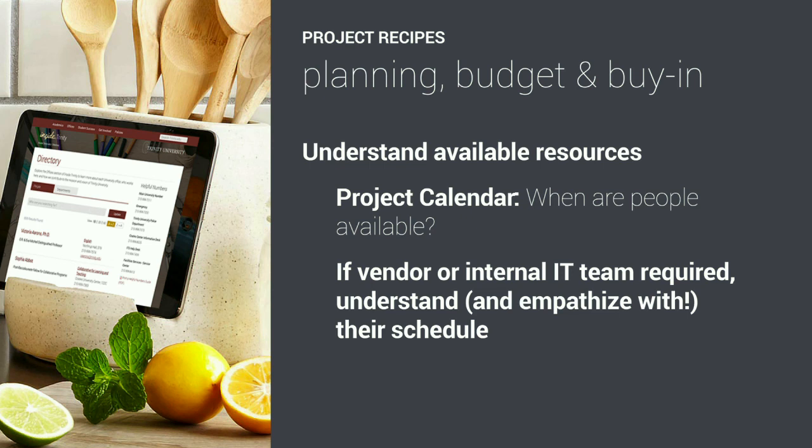If you want to work with the registrar, or if you want to work with the planning committee, it's really helpful if you know when their busy times are. What's a good time for them to have this project? When you know that, it shows a sense of forethought, that you've thought through what it is like for this person to experience this project. How can we make this as easy as possible for them? How can we make sure we get the attention that we need for the project? If there's a vendor or internal IT team required, it's helpful to understand and empathize with their schedule. What's a good time for that external team to help with this? Is there a certain time in the schedule that we can make this work together? And the more we understand the overall roadmap, we can slot those times in a lot better.